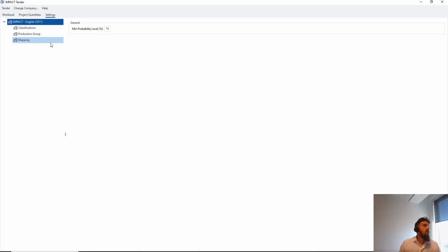The tender capacity, or the rough capacity, you can then see in a graph alongside your actual rough planned elements, the fine planned elements, and the elements that are already on your table. So those 3 different levels. So far in Resource Manager, we had the level of rough planned elements and fine planned elements. Now we're adding an extra layer, the tender elements. The elements are not in the software, and we want to represent them somehow. That's the workload graph we will end up with at the end.